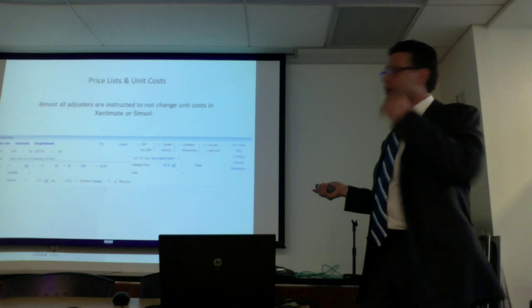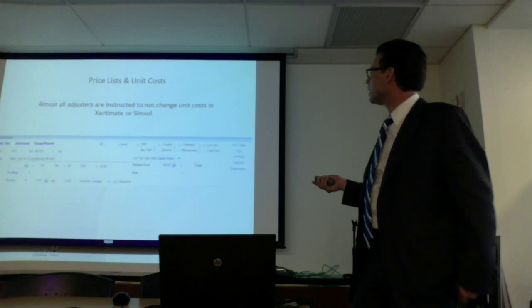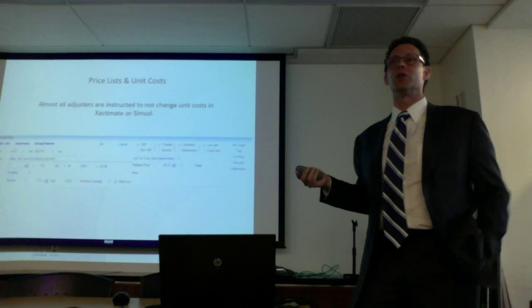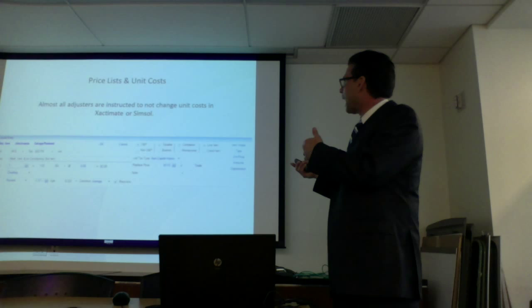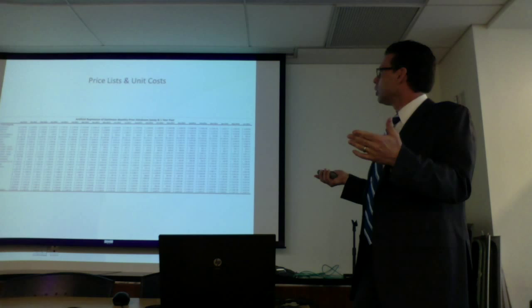I would then add a note which shows up in the estimate, and I would put that this price comes from Bill's Mechanical and they already did the work. An appropriate estimator would go in and then remove overhead and profit and tax, because that invoice was done by an individual contractor. The cost is not subject to overhead and profit, and tax should be included in the invoice number. When this is done, and you use a bid item, instead of altering the price itself, what happens is you don't affect the price list.